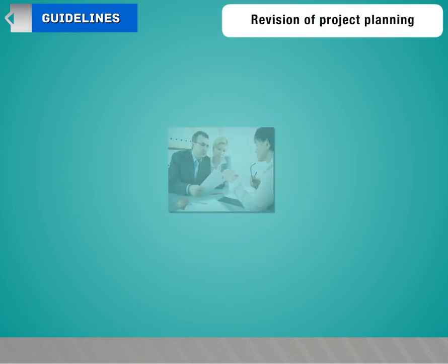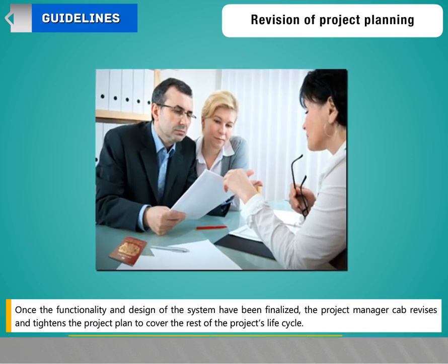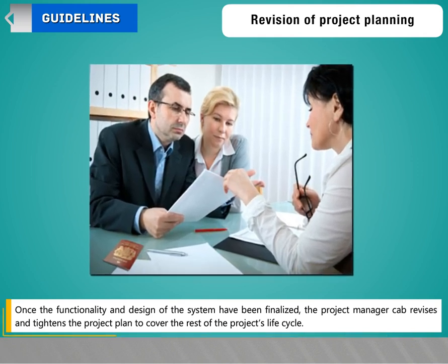Revision of project planning. Once the functionality and design of the system have been finalized, the project manager revises and tightens the project plan to cover the rest of the project's life cycle.